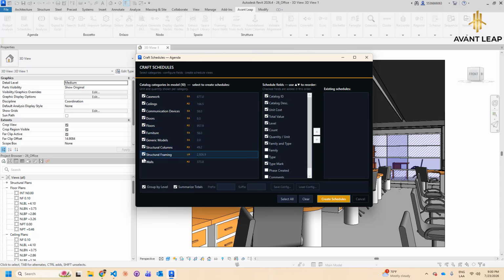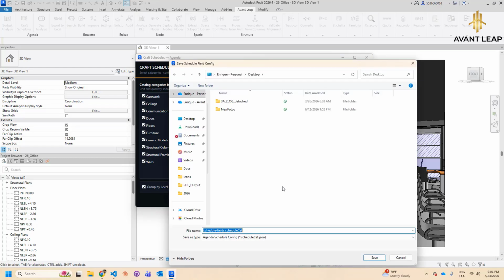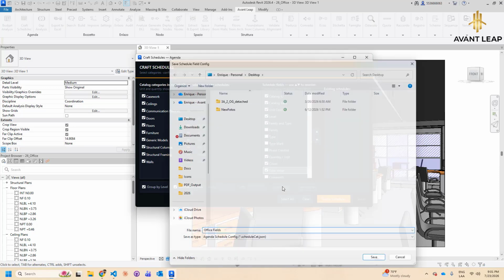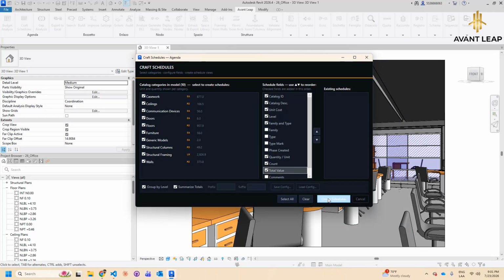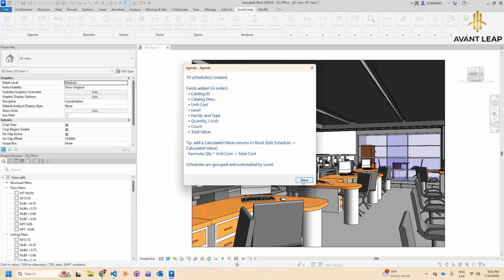Scroll through the budget grid to review every line item: doors, floors, furniture. Each row shows quantity, unit cost, and total. You can edit unit costs directly, switch measurement units between EA, M2, M3, and LM, and the totals recalculate instantly.